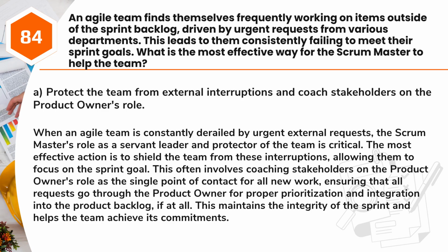This often involves coaching stakeholders on the product owner's role as the single point of contact for all new work, ensuring that all requests go through the product owner for proper prioritization and integration into the product backlog, if at all. This maintains the integrity of the sprint and helps the team achieve its commitments.